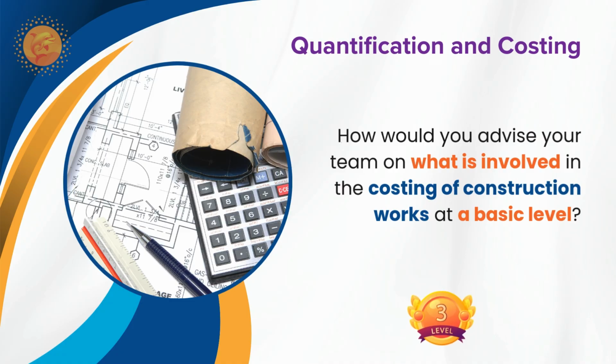Yes, we can build the rate by using the first principle of material, labor, and equipment, and profit, and risk allowances. Also we can use historical information from our past projects and adjust the time and location for the specification to address the rate.